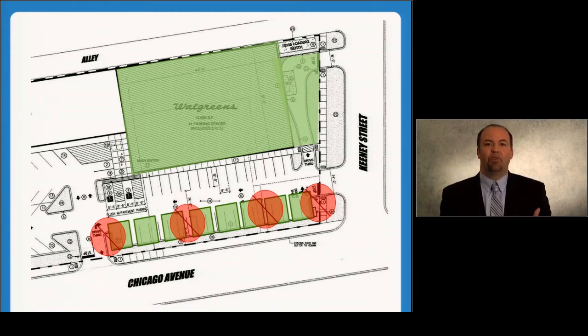When we began to look further into wind, it turns out that we were having a hard time finding a small wind turbine manufacturer that wanted to partner with us, or was actually going to stay in business long enough, and had a technology that we felt we could rely on. So we pulled the wind out. That dropped us down to about 300,000 kilowatt hours.